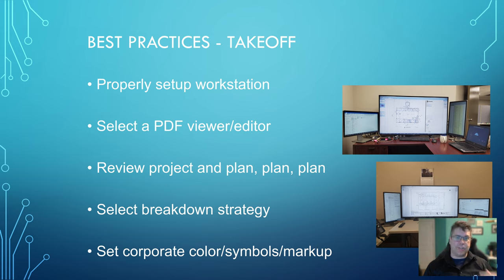That is essential to planning for that day of closing. Decide how you're going to break out this project, and how you're going to generate all the closing documentation. This could be that the owner has a tender form, and obviously there are all the drawings in the package. Then you might want to break out by system.